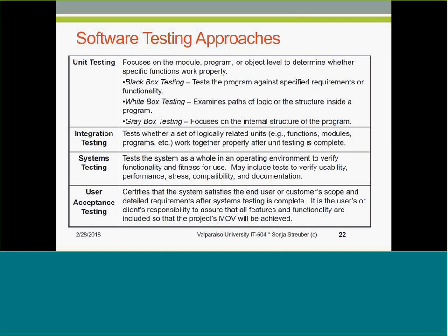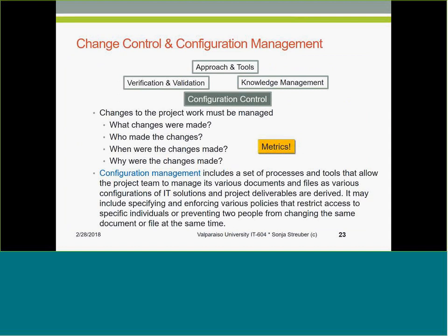Now, how does our product get deployed? Well, our product gets deployed through configuration control, because configuration control itself is our last bulwark between our test system and our live system, our production system. So configuration control governs changes to our live environment. Let's say, for example, you build new functionality or a new database functionality for Amazon.com, right? You certainly don't want to deploy that new functionality in the middle of Christmas season when everybody is buying Christmas presents, right?